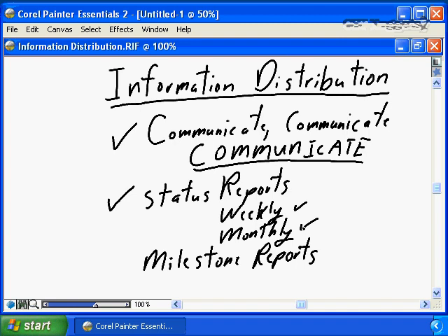Manage problems, deal with problems internal to your project to the point where you as a project manager have power to influence the problems, but once the problems reach a point where it's beyond your capacity to affect improvement, it's your job as a project manager to ensure you're reporting, you're communicating, you're delivering full, honest, open status reports to the project stakeholders, to the project sponsor on the identified frequency.